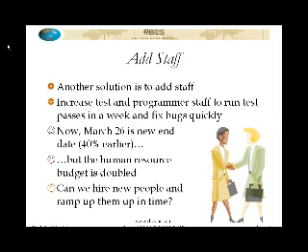And what else could we do? Well, we could add people. We could increase the number of testers. We also have to increase the number of programmers. If you just increase the number of testers, you're going to be able to execute your tests faster, but who's going to fix the bugs? Somebody's got to fix the bugs. So maybe we double the number of testers and programmers, and we say, okay, now we can pull the date to March 26th. Assume that we're able to run the tests faster, fix the bugs faster, and parallelize a lot of tasks. They're running at the same time.